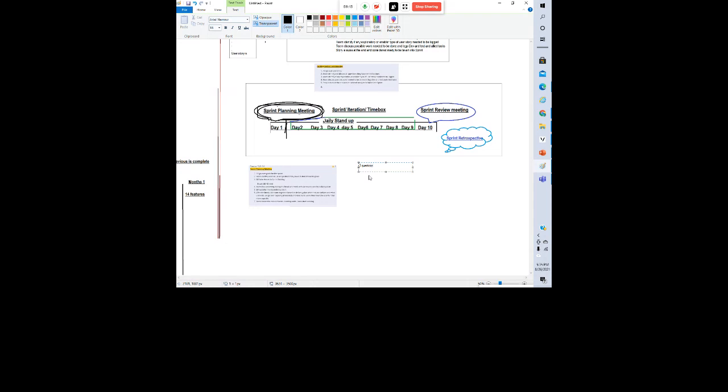Okay. So everybody answers 3 questions: what they have done yesterday, what they will be working on today, and if there is anything blocking their work.